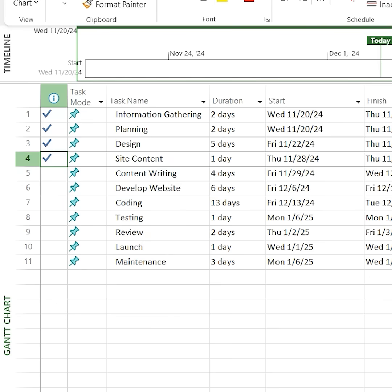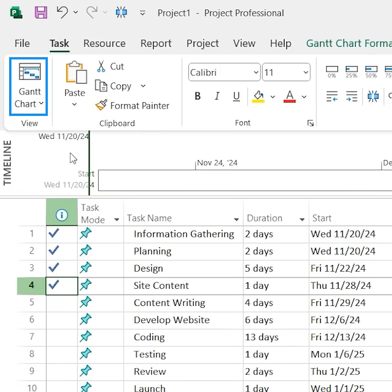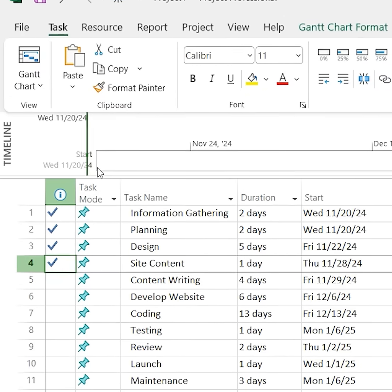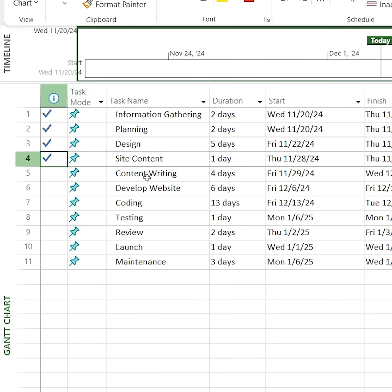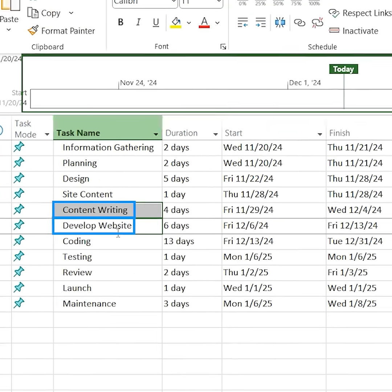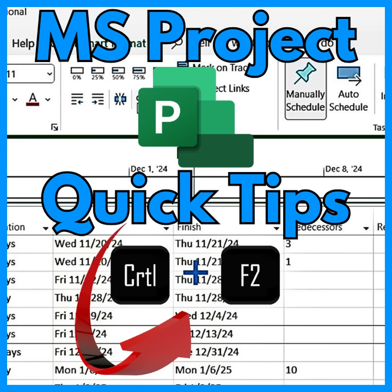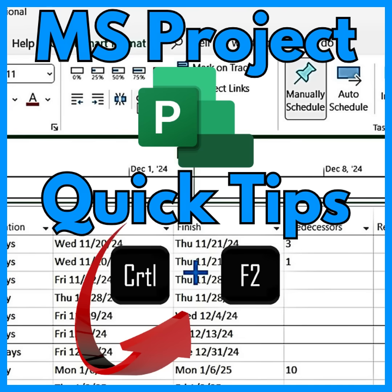Here's how to link tasks. Open the Gantt chart to visually see all tasks. Select the tasks to link, like draft content and develop website. Click Link Tasks, or use Ctrl-F2. A link appears showing the Finish to Start dependency.